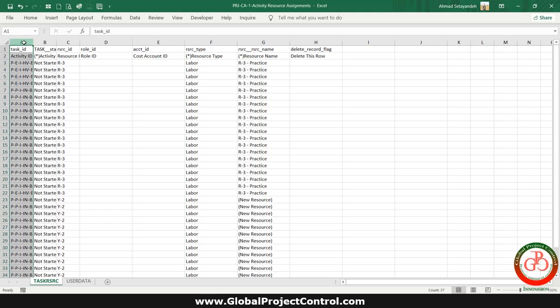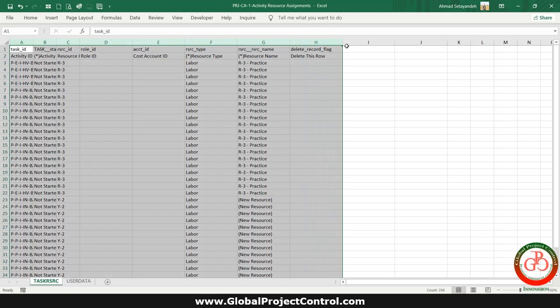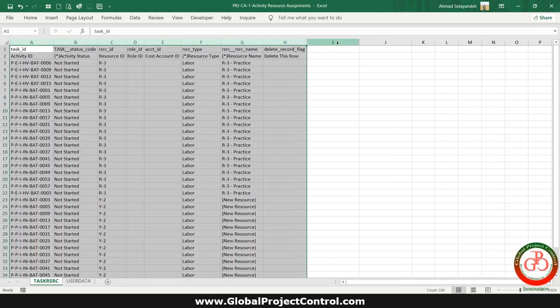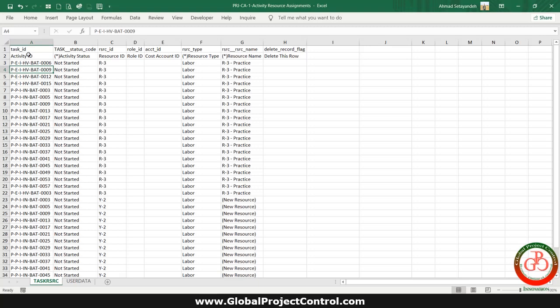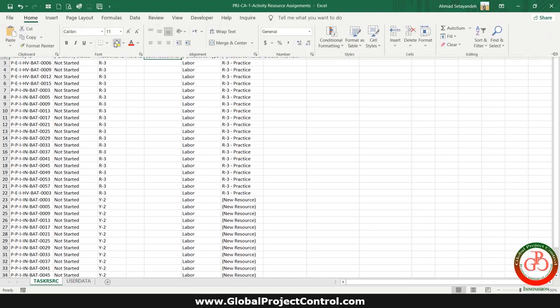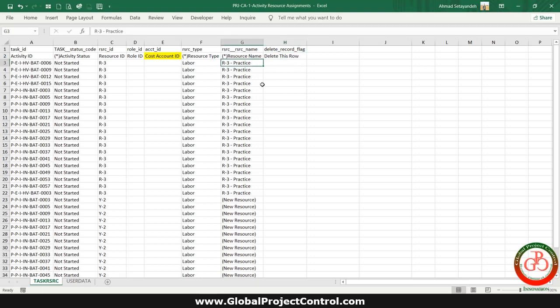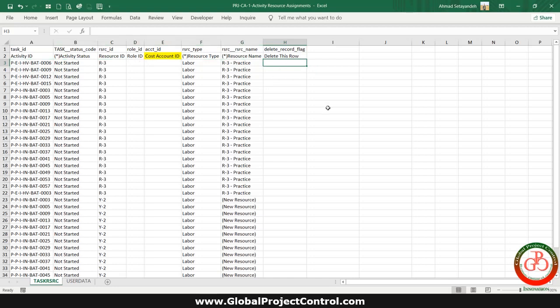After each export, you need to verify the fields which you exported. My exported file included activity ID, activity status, resource ID, role ID, cost account - let me mark it - resource type, resource name, and delete this row. So what is delete this row? It means that if I want to remove this assignment from project, I should use this character over here.